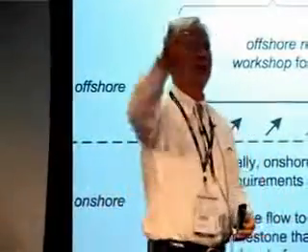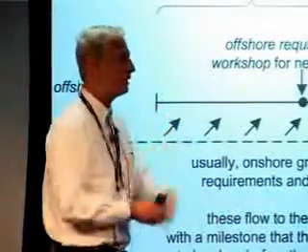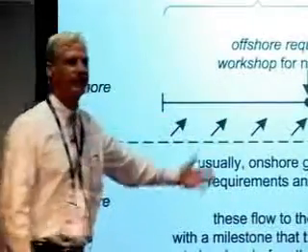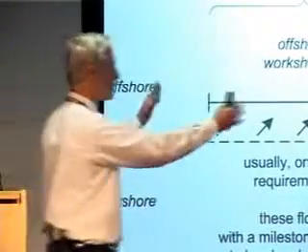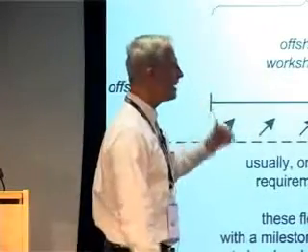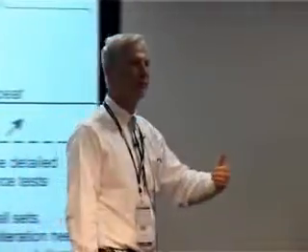Then we would go into a room, this is in India, and we would have displayed on a computer projector the requirements that were written in text by onshore teams in France. And then as a whole group, we would go through the requirements together and come up with questions for clarification and have discussion. And then we would try to understand as a group the requirement. That workshop would typically be 2 or 3 hours long. Then after that we would have a video conference session with the onshore team using Skype video, in which we would go through unresolved questions to try to clarify further. So this is something that we found sort of works to try to address the requirements transfer problem.